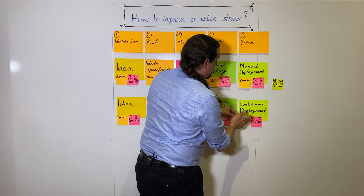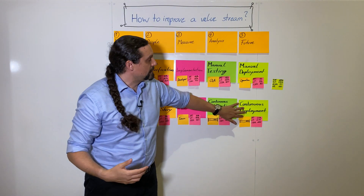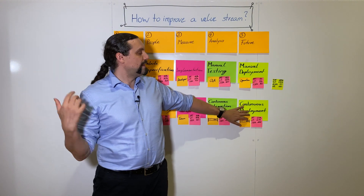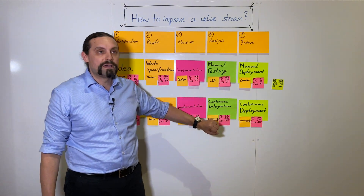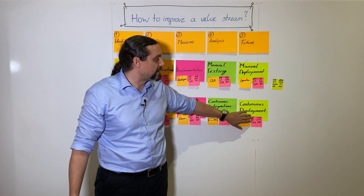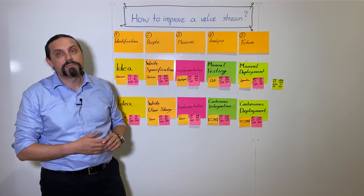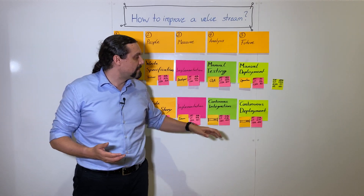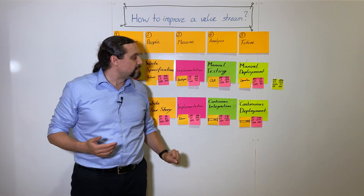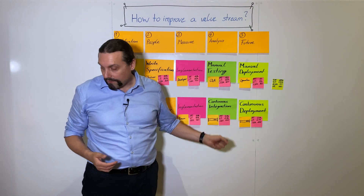The next step will be continuous deployment. There we want to automatically deploy directly into UAT and then also directly into production if everything is okay. Again here we have a process time of 0.1 hour, lead time of 0.1 hour, and a target percentage complete and accuracy of 100 percent.